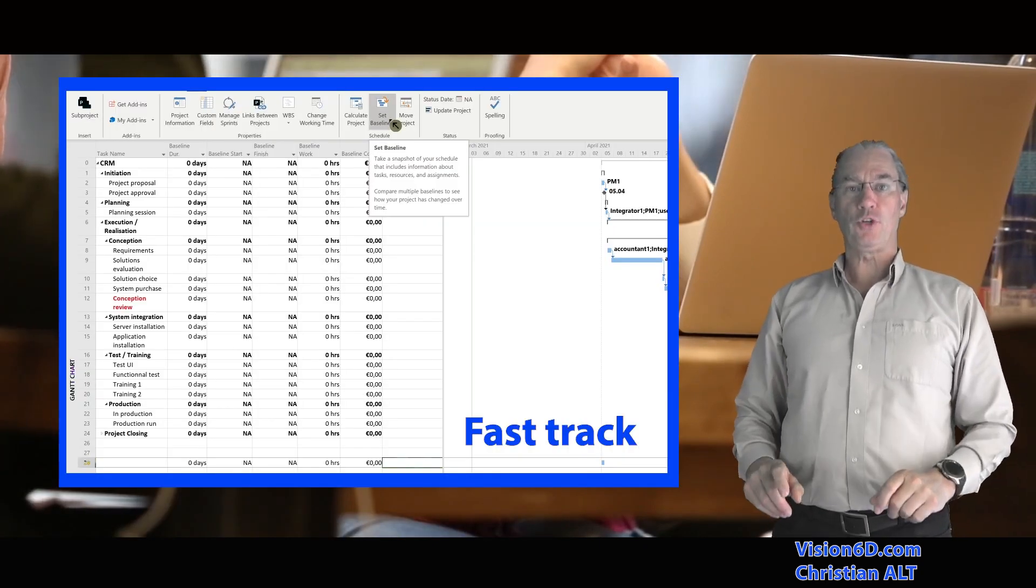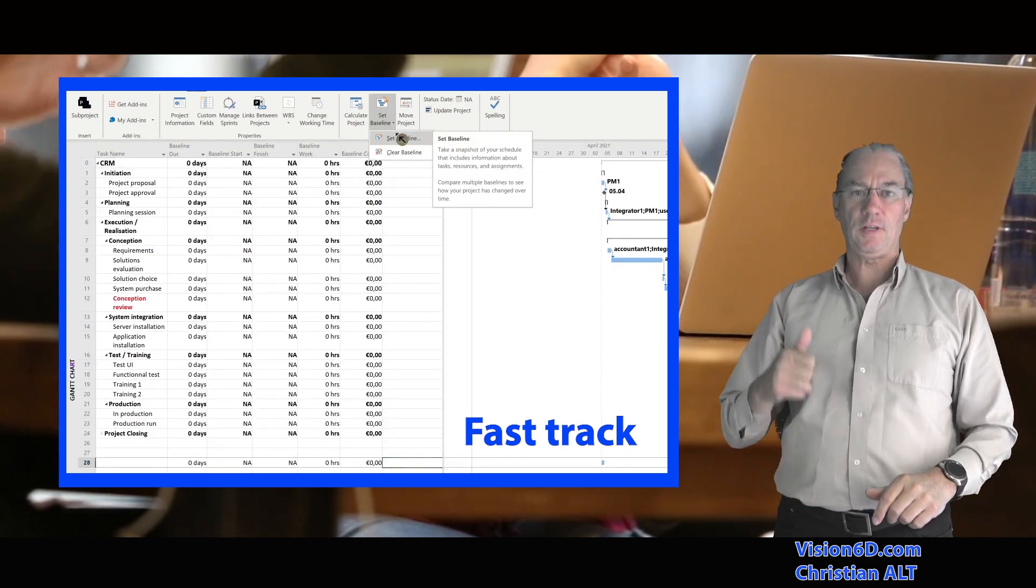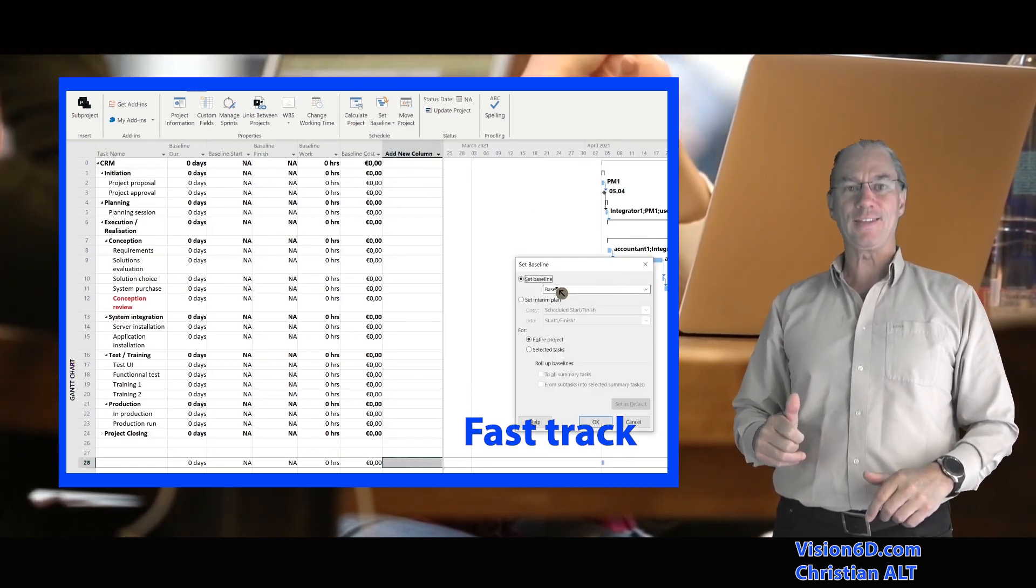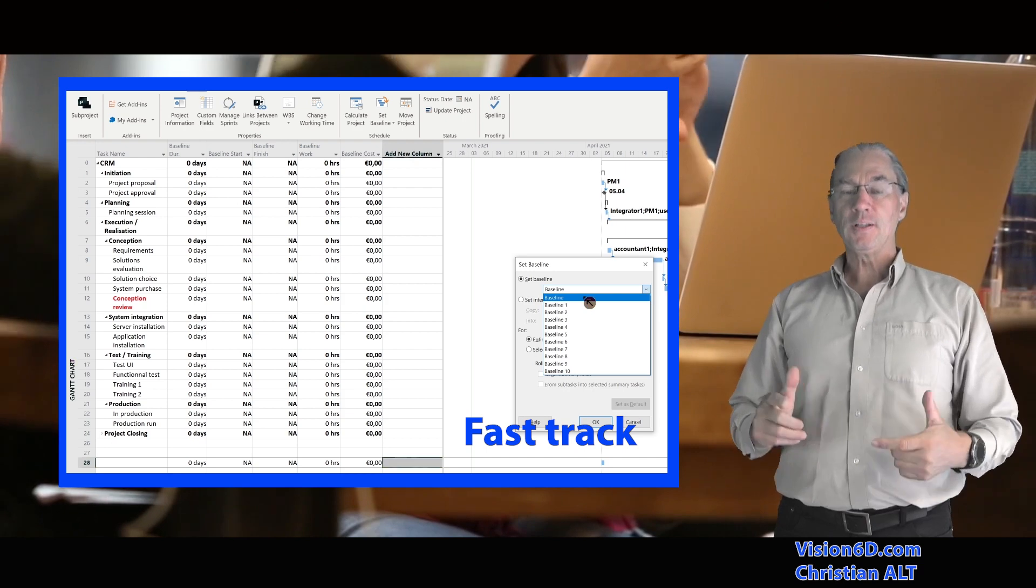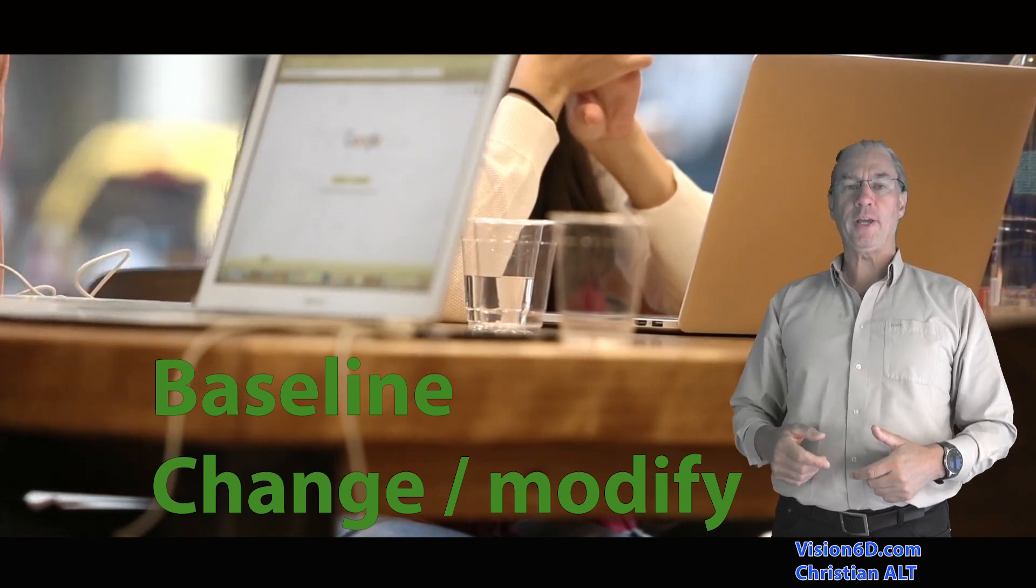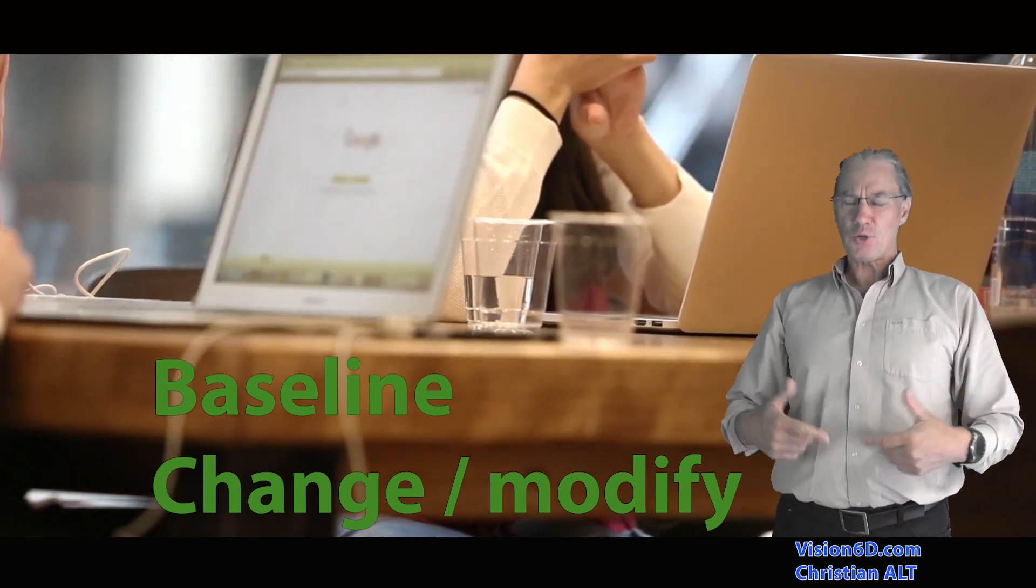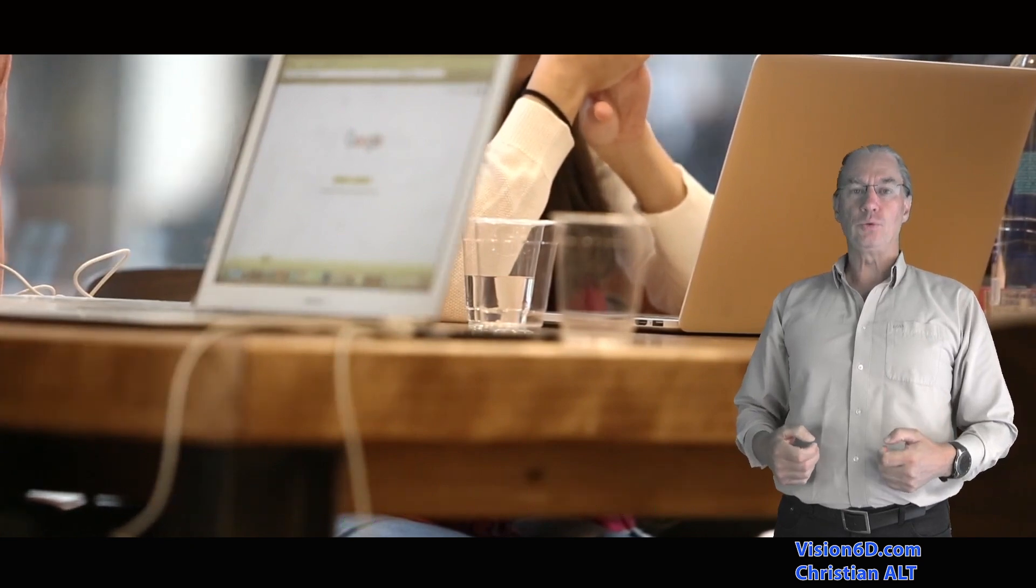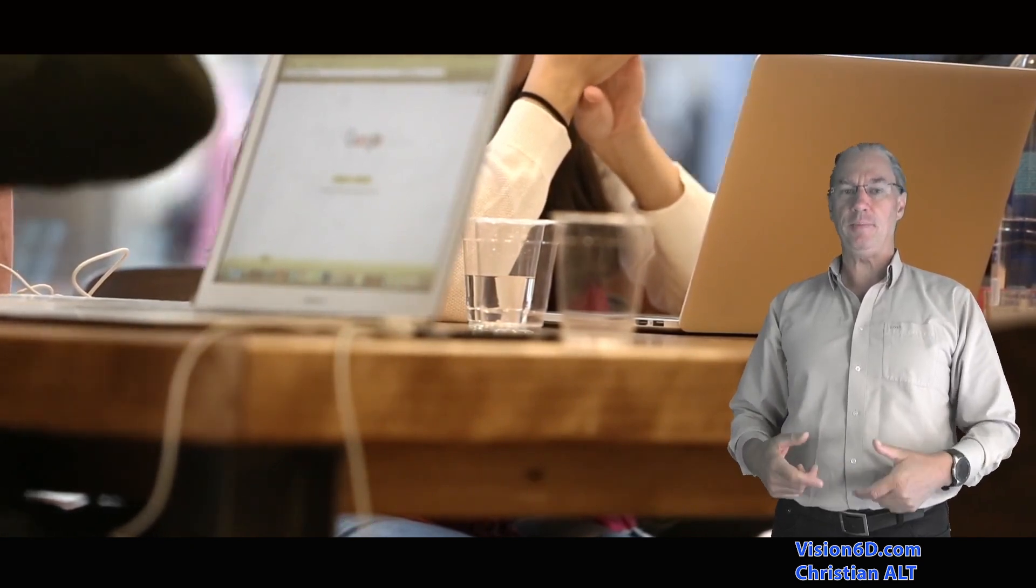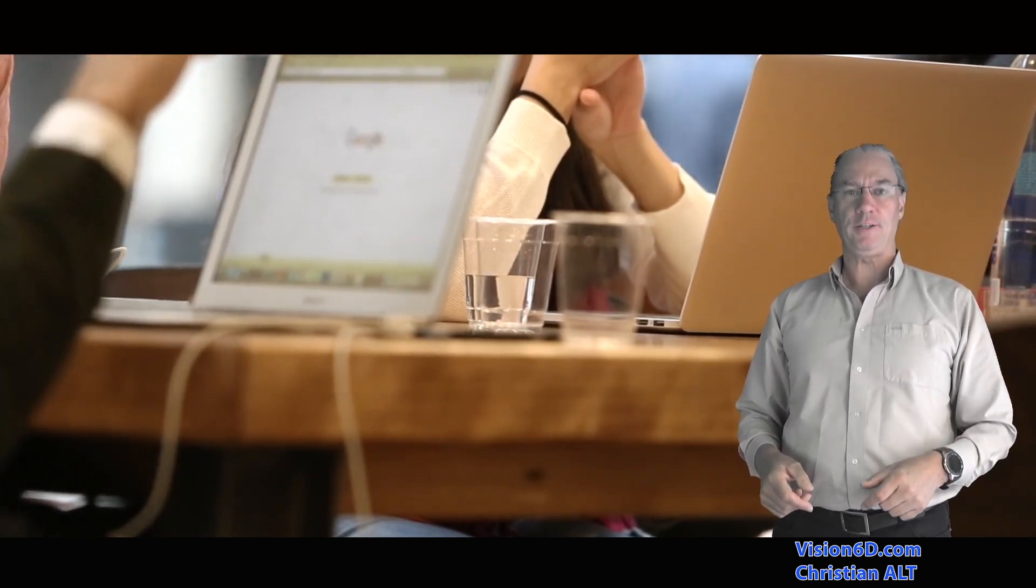So overall the project was really fine in terms of budget and scheduling. There is one thing that was suggested and approved: we would add a training for the sales people. So I need now to change my planning and I had already done my baseline, so I need to modify my baseline.